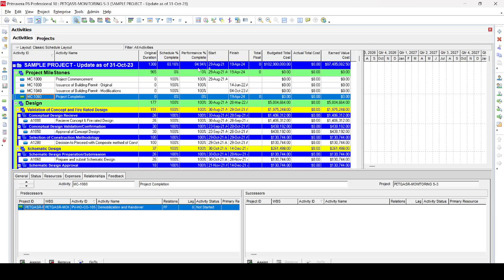And now what happened? The contractor wants to make his payments, and we want to calculate the progress payment for a few months before. For example, this is October, and we want to calculate the contractor's progress in the month of August according to the updated baseline program. In this program, you can see that we already have budgeted costs and values, and the resources are already assigned. So we want to remove all this one by one. We are doing this by the use of the global change tool.